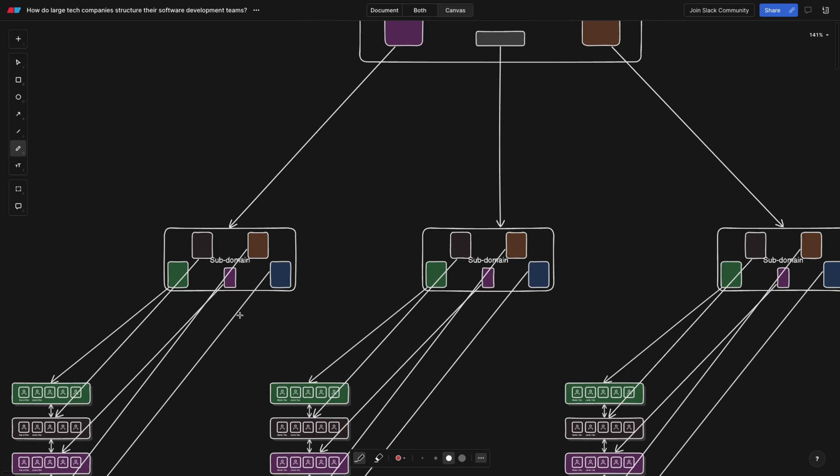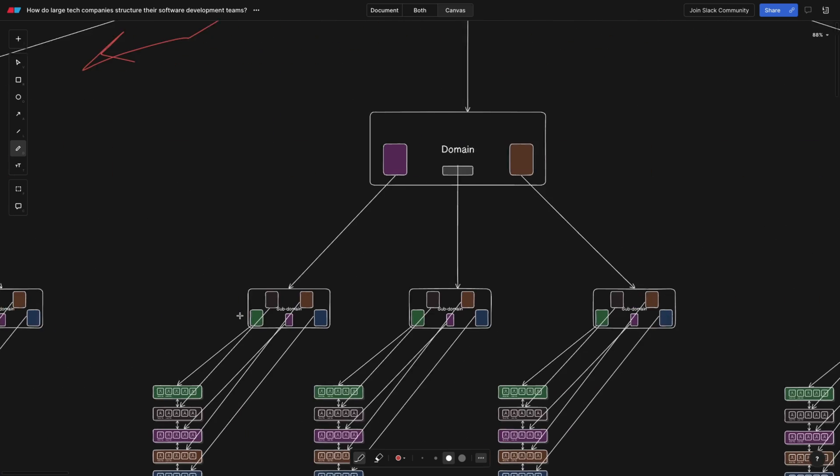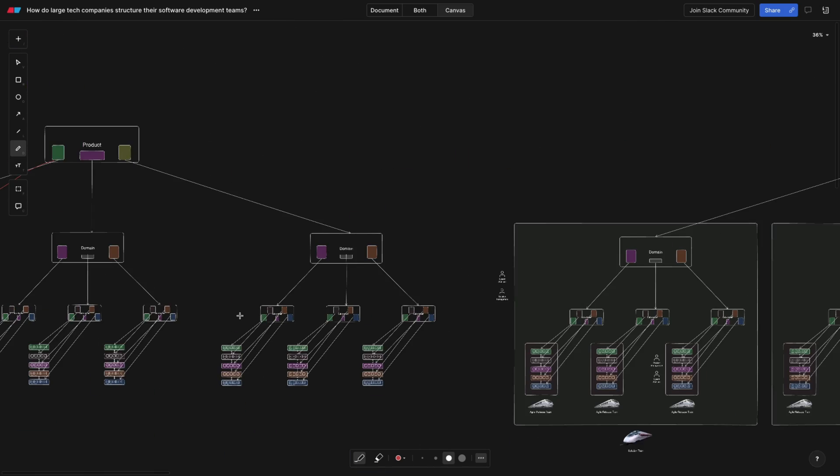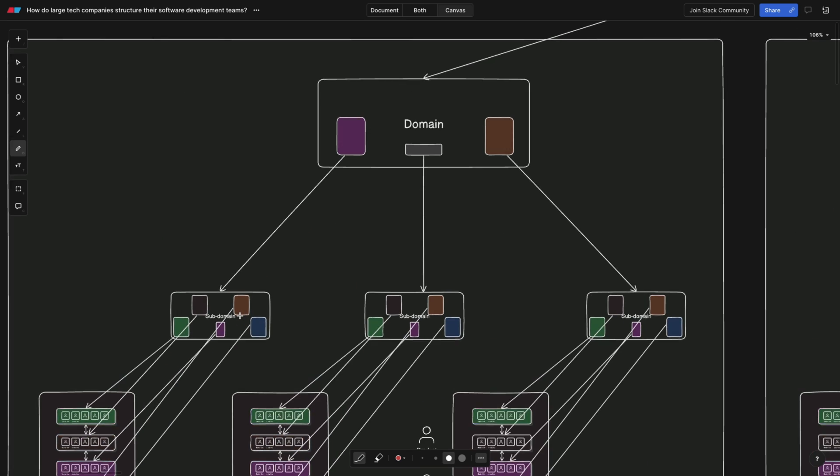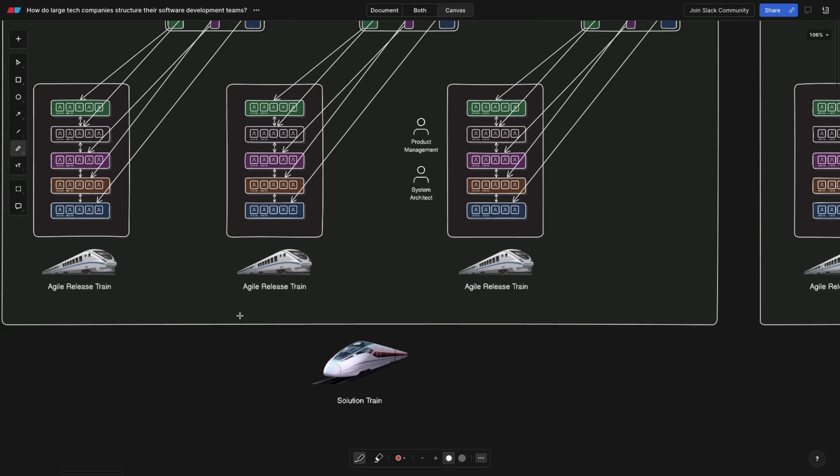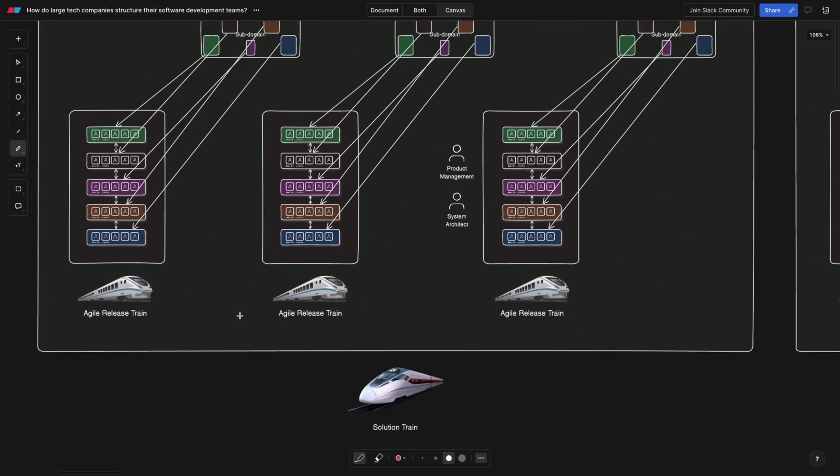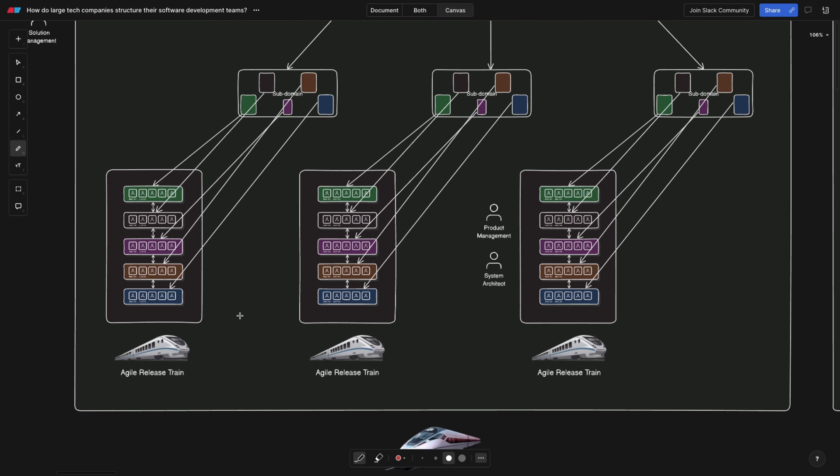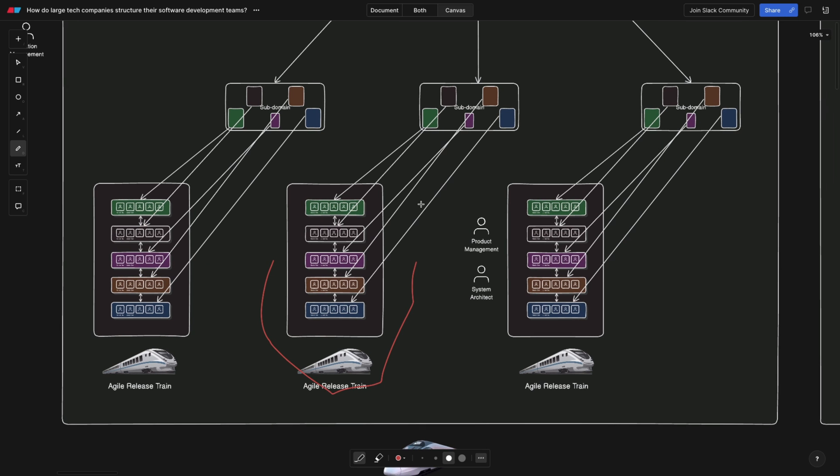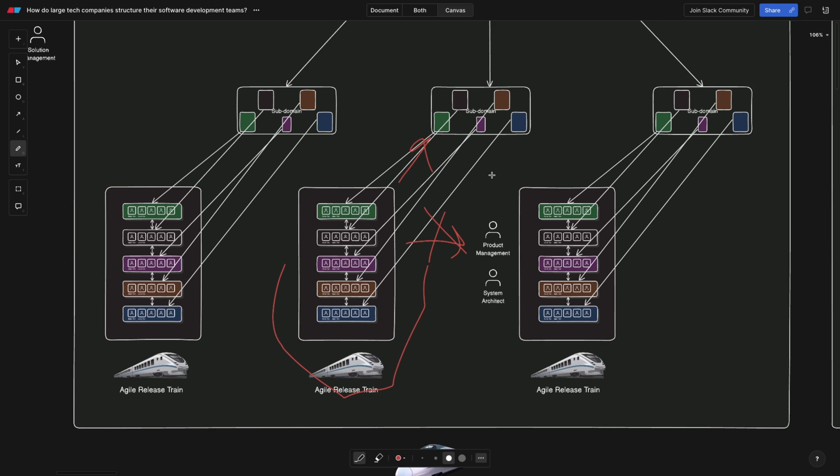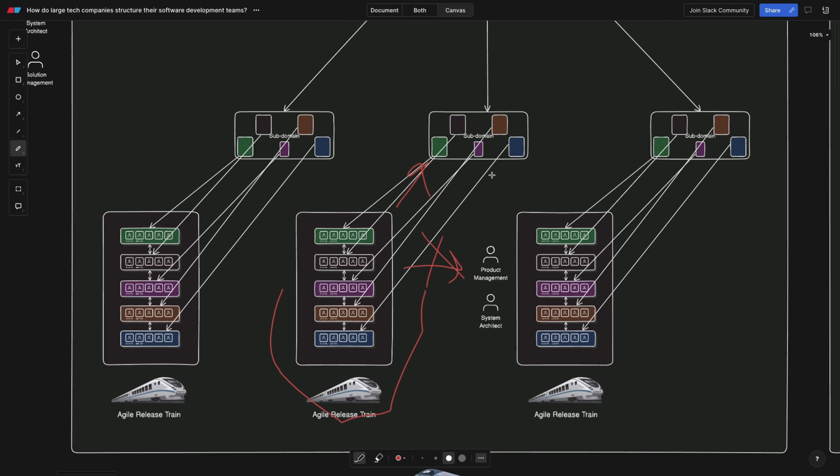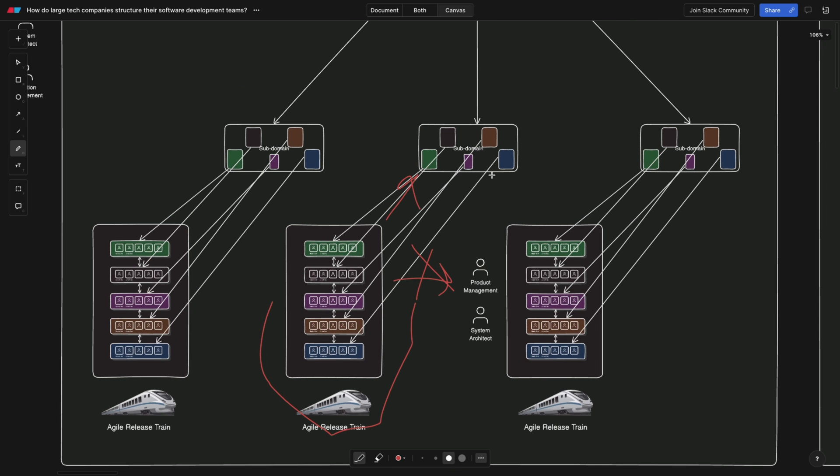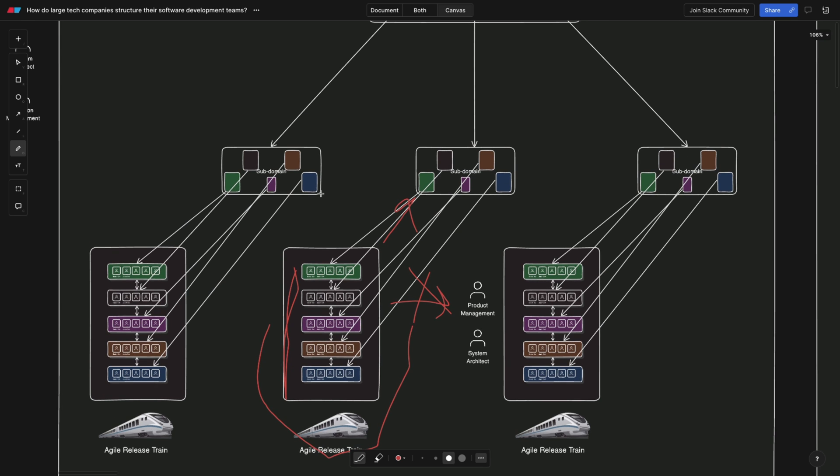Well, we introduced an agile release train for a particular domain. Yes, imagine it's literally a train and subdomain teams are the wagons. Teams have a priority, which is improving a subdomain within their release train. This way, this team doesn't have to care about other teams, which reduces the cognitive load, and now you have a company within a company in a way. As you can imagine, the teams are aligning the same way, but within this agile release train. The question is now, agile release trains need to align with each other too. How is this done?